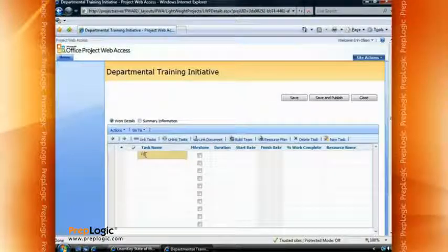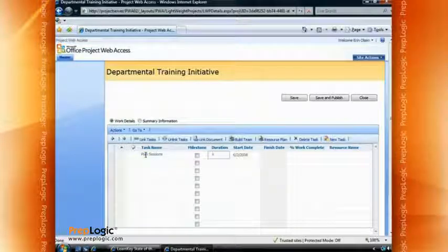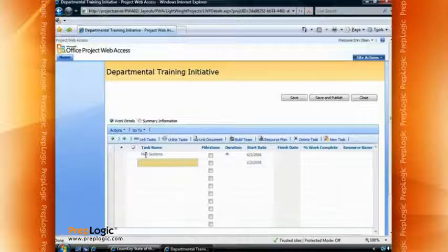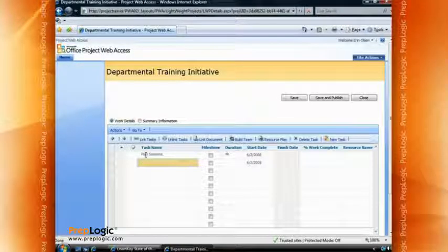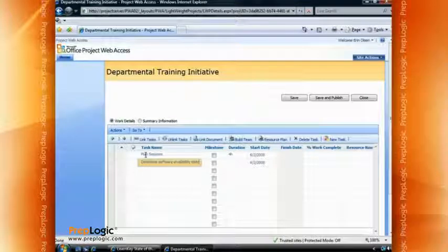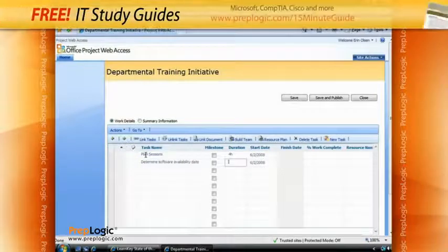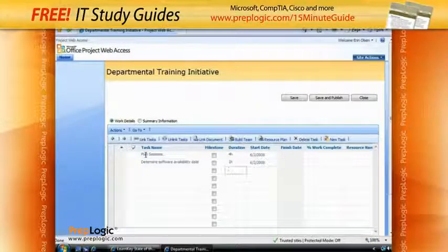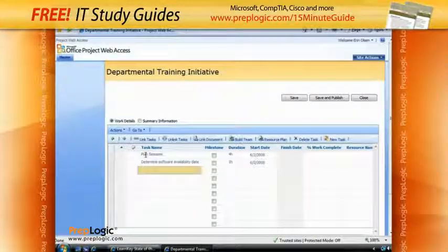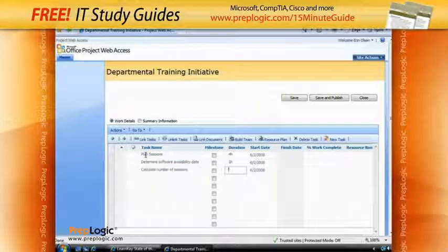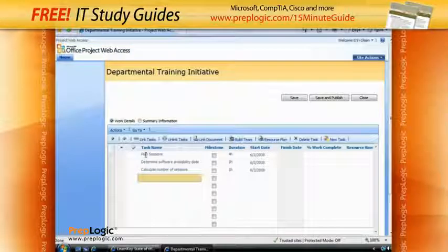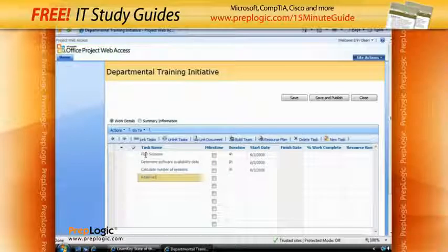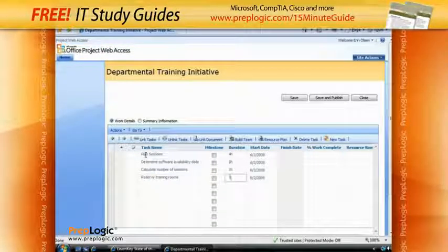To work with this, we first need to 'Plan the Sessions' — I'll use my Tab key to move over for duration, and we'll say that's going to take four hours. Part of this planning will be determined by when the software is available, so I might put in 'Determine Software Availability Date' — that's probably going to take about one hour talking to the IT and programming people. I then need to 'Determine How Many Sessions,' and we'll make that short as well. And one more: 'Reserve Training Rooms,' which might also take an hour.